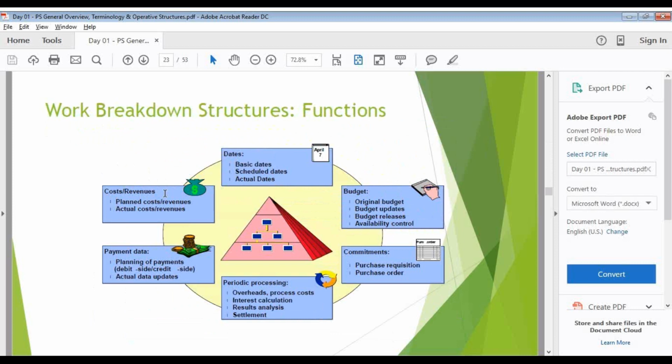My budget will get consumed once the commitment gets triggered. If I'm going to exceed, or when I'm going to near my consumption of a budget, the system will trigger warning messages, information messages, and error messages. These things will be configured in tolerance.